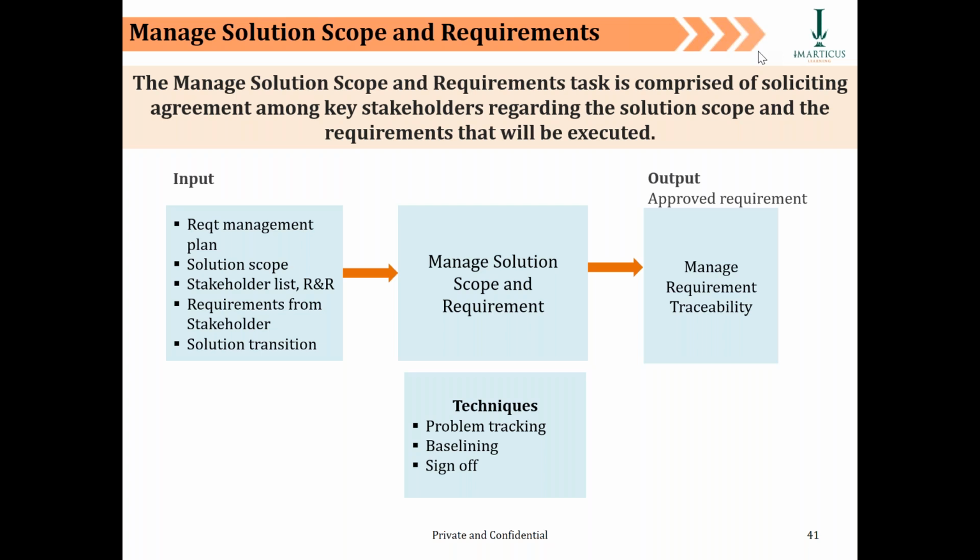baselining. So please baseline, please be cold, brute, regardless, sometimes, and package the requirements in the way that if something is contained within the baseline, fine, or if there's a spillover effect, you put it into an additional addendum of requirements which has come up but is not covered under the current project contract.